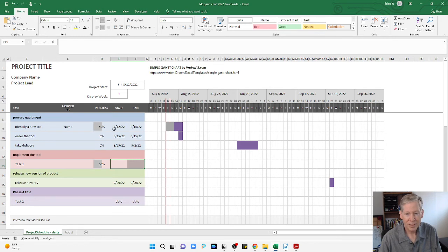And honestly, quite often, your tasks are not going to start. They might be dependent on each other, but that does not mean that a task won't start until the one's completely finished. For example, you might have one task that's going to take 2 weeks. And the next task down below that needs to have the first week of that first task done before they can start that. So there's dependencies that will start in the middle.